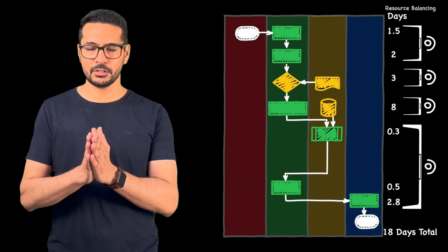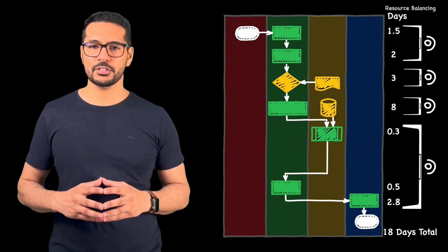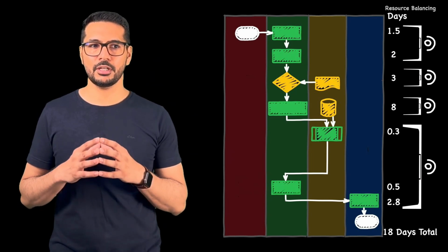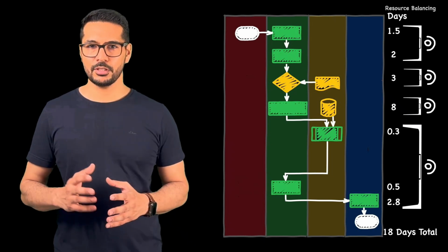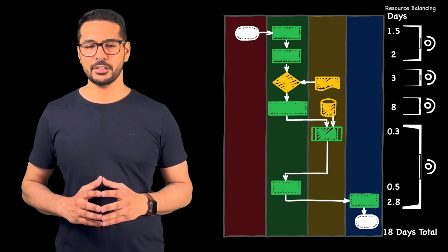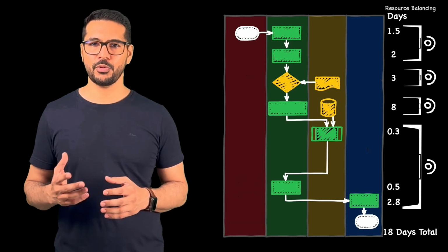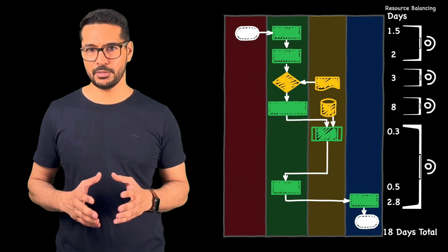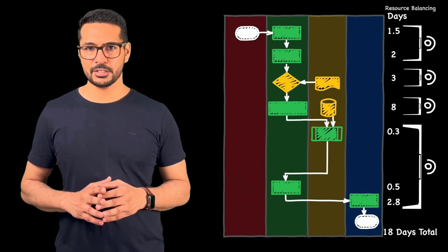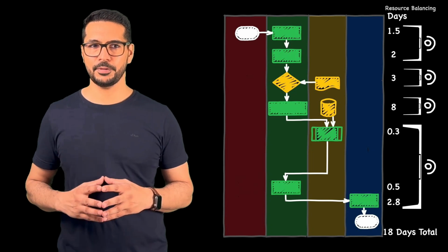So in this first step, for all the steps being taken in the office, we are writing what the required processing time is for these tasks. In this example, you can see that there are 7 tasks which need different times from 1.5 days to 2.8 days, and in total the time is 18 days, and these tasks are being performed by 4 employees.